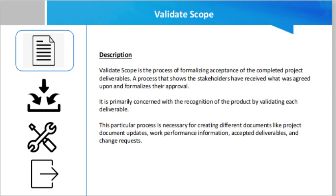This process is necessary for creating different documents like project document updates, work performance information, accepted deliverables, and change requests. Since the Validate Scope process mainly focuses on the deliverables, the verified deliverables are obtained from the Control Quality team. The deliverables are reviewed with the customer to ensure they have been satisfactorily completed. Different outputs of the project management knowledge area — like scope baseline and work performance data — are treated as the baselines for final acceptance.